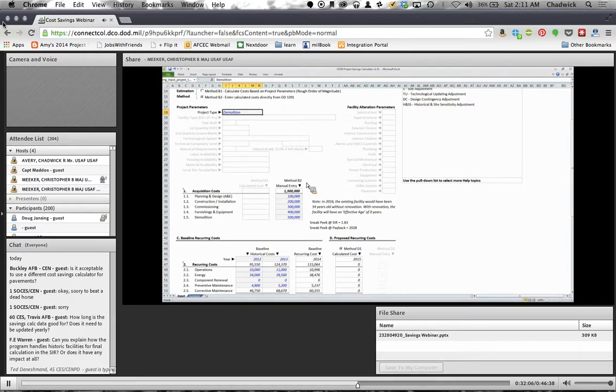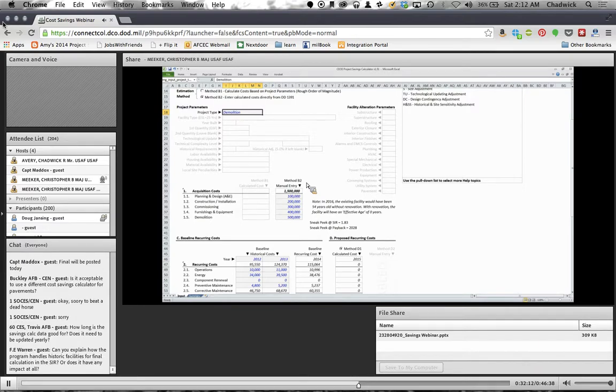An example there, and I'm guessing I'm following you, Patricia, is a utility rebate from your utility company. We do something and the utility comes back and cuts us a check for $30,000. Yes, we want to capture that in the third-party funds. I know those who use BLCC regularly are already doing that and using it as part of their SIR calculation.